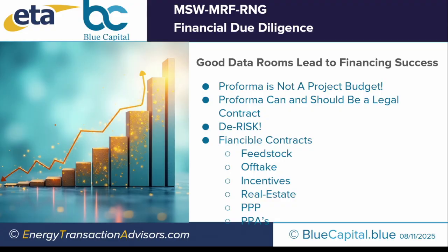All right. Financial due diligence. So we have seen a number of really, really bad data rooms, and financiers do not like bad data rooms. The other thing we see a lot is people will come to us and they'll say, oh yeah, we have a pro forma, and it's a project budget. They are not the same thing, not in a million years. And project budgets, often in the engineering world, that's what we do because we're submitting proposals to either our universities or to government agencies, and they want a project budget proposal. But pro formas are a very different animal.